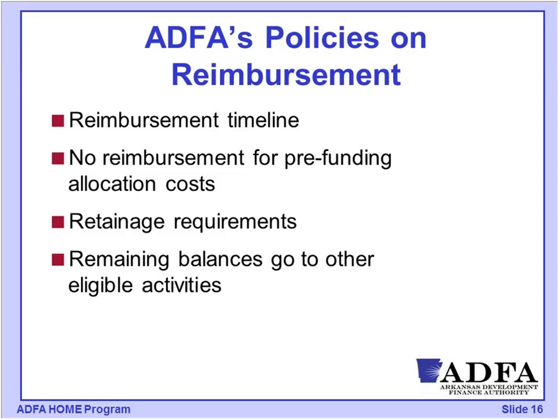You are not eligible to reimburse expenses that you have incurred prior to receiving your award. Other things to keep in mind, there is a retainage that is going to be held back from each of the draws throughout the project. That retainage is released 30 days after the final inspections have been completed on the project.